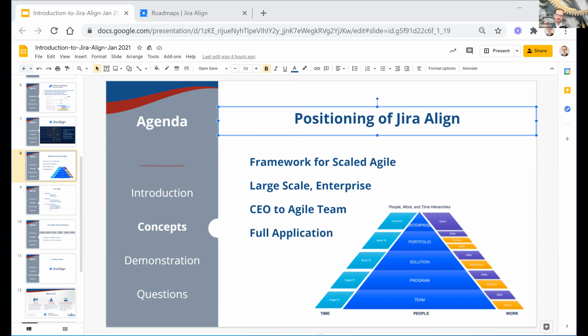And again, typically what we see with most organizations is the feature work item in Jira Align would then sync over to Jira, and it would sync at that epic level in Jira. So I think currently you can't rename that in Jira. You can't change the terminology. I think at some point they're going to add that in, but that's how it would sync up. Features in Jira Align would sync up to Jira epics.